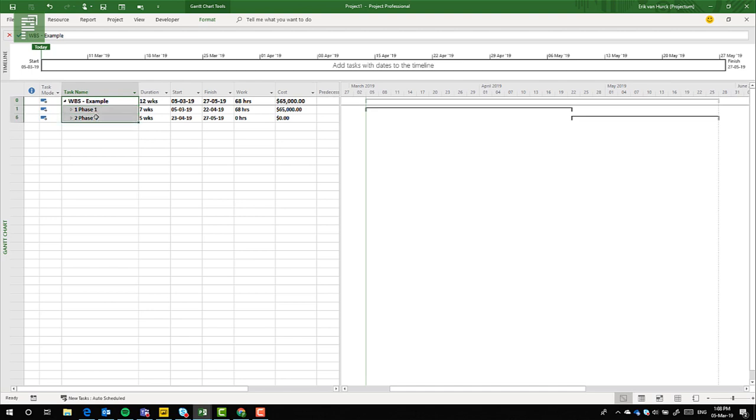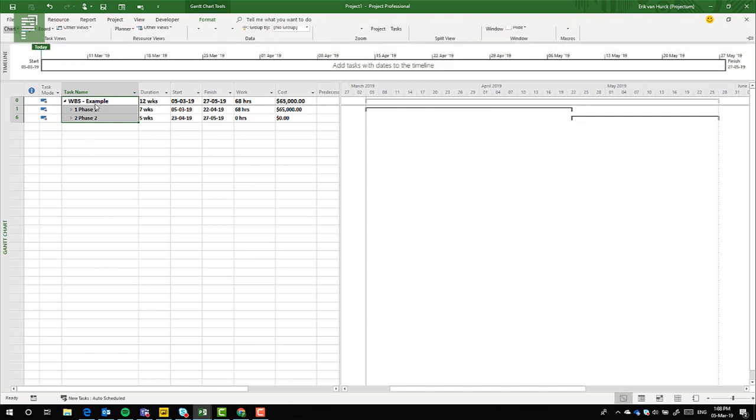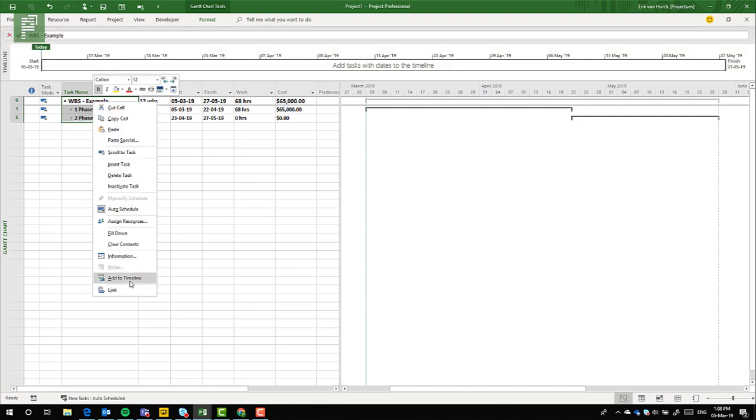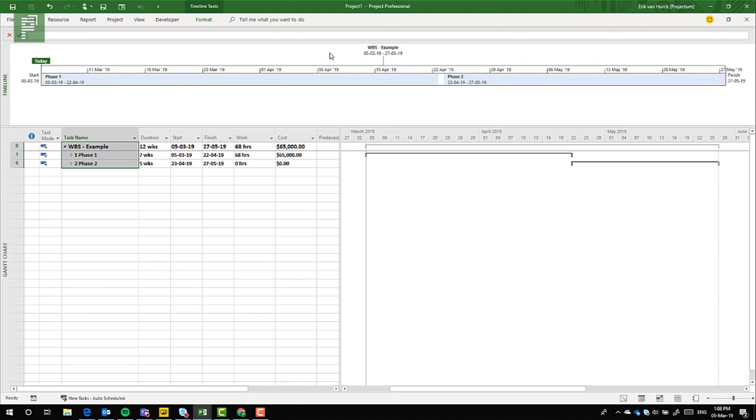One of the things that I like to do is I would like to select the highest level, and that can be done easily by selecting View and then Outline Level, Level 1, selecting everything that's in there and slamming that onto the timeline. This gives you a nice overview of all the phases. It even grabs the project summary task, which you can pull up or call out, as it's called. Call out to the top, and you have these phases, and you can give them another color if you would like to do that. We'll do a whole different video on the timeline, don't worry.